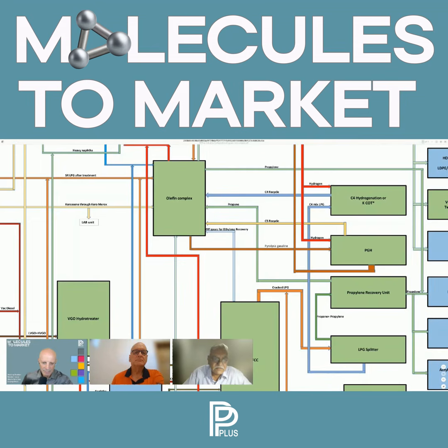Okay, so in a nutshell, what I was trying to tell is, on the refinery side, there is a possibility of basketing some technologies. But on the petrochemical side, there is very little option. One will have to resort to technology selection as such, because there is no licensor who would be willing to basket.